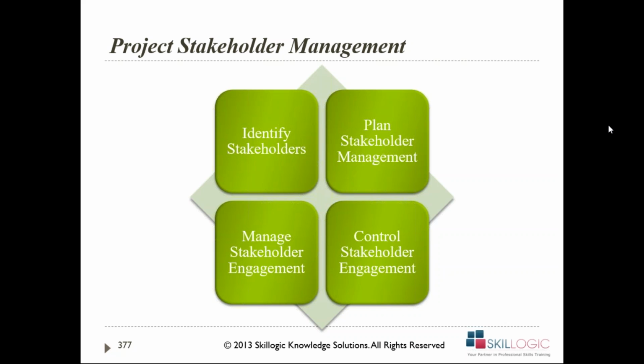For example, if there is a stakeholder who has very high power and very high influence, you want to manage them very closely. Versus someone who doesn't have that high power, is not getting impacted, doesn't have any influence on the project. If that's the situation, you might just keep them on radar. You might not manage them closely. You just want to keep them on radar in case their power or influence is increasing or they're getting interested in your project. So different groups, you would manage differently. Probably some of these groups you might want to delegate to somebody else to manage.